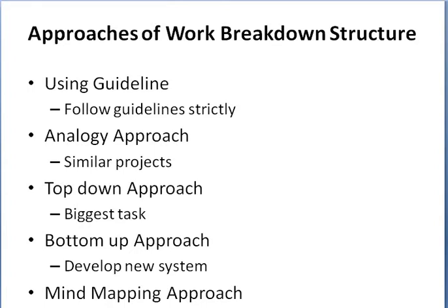Let us take an example of US Department of Defense, which prescribes the form and content for work breakdown structures for a particular project. So many Department of Defense projects require contractors to prepare their proposals based on the provided work breakdown structure.